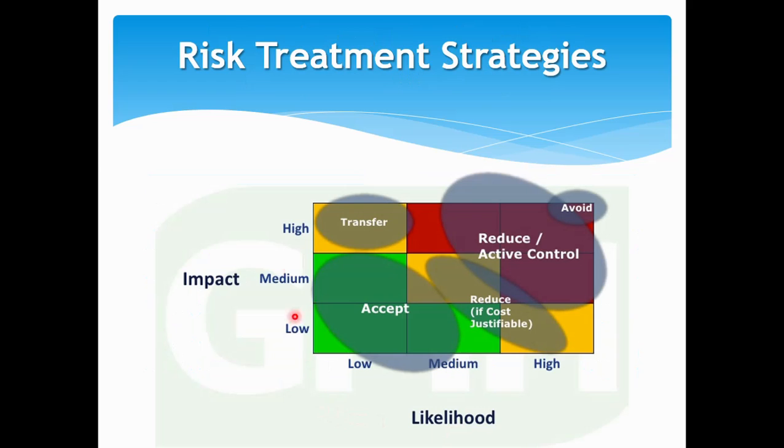So again, for the negative side, if I take it visually, there's a high impact like a fire, but the likelihood or probability of happening is low. You can transfer those risks. When it's a very high probability of having high risk stuff, you can, as a team, start avoiding those risks as much as possible. And for very low likelihood of happening, where even if it happens it's a very low cost impact to us, then of course you can live with it, and you can start accepting and concentrating on activities which are in these boxes.